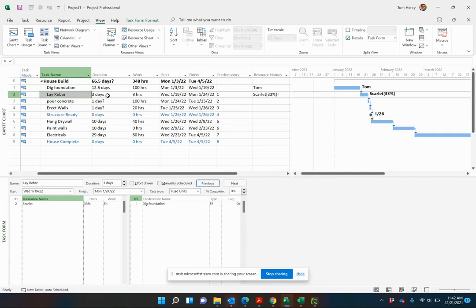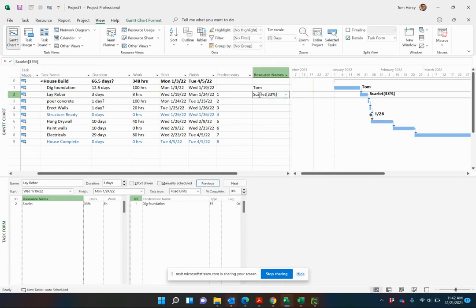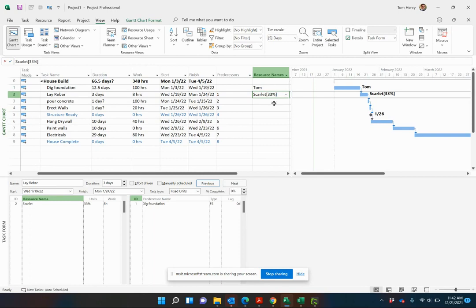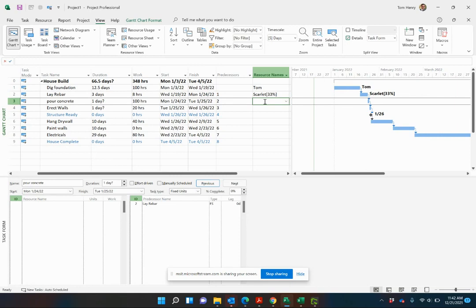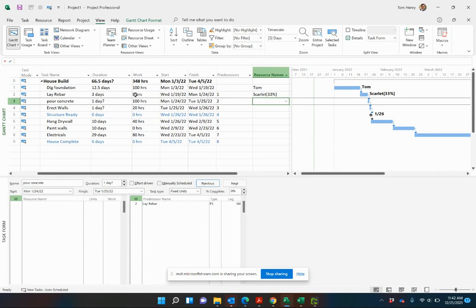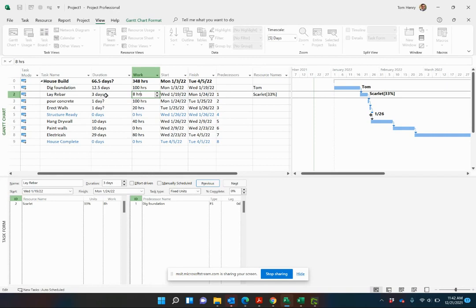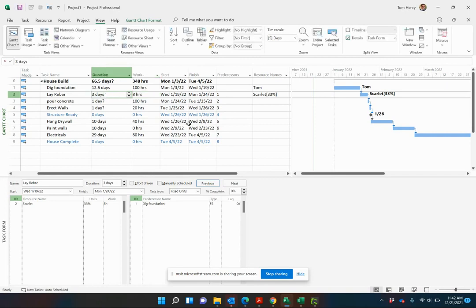Now, because it's a three-day task, only eight hours of work, she is now working 33%. Essentially, she's working part-time at 33% of a typical working day. As you come in and estimate the work and the duration, you can get more granular. You can see these calculations taking place rather than having a three-day task. By default, it assigns that resource at 100% units. Therefore, it would have been 24 hours work. But because we've estimated the work and the duration, Microsoft Project calculates the unit for us for Skylar.